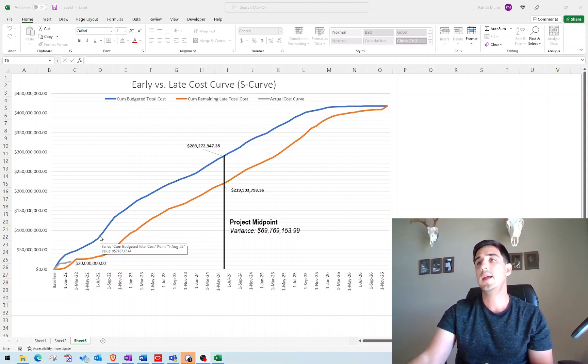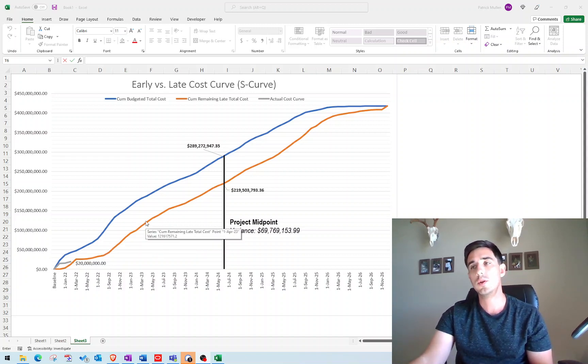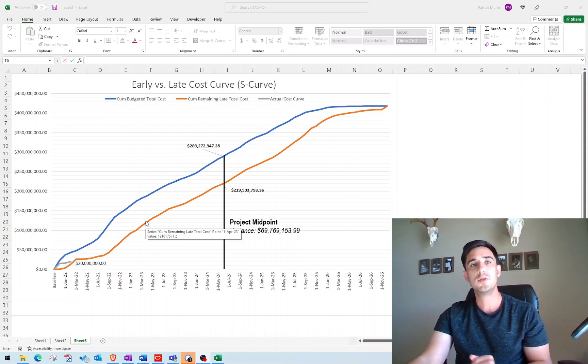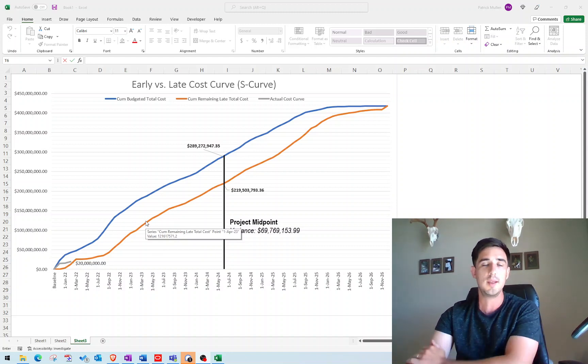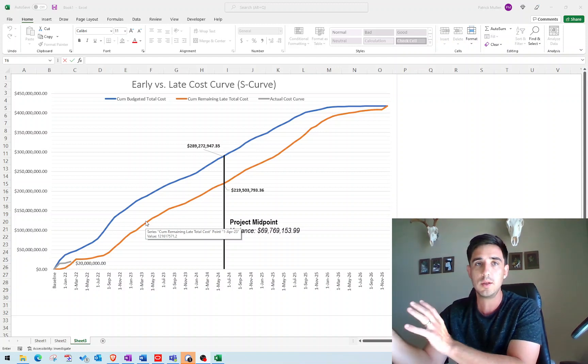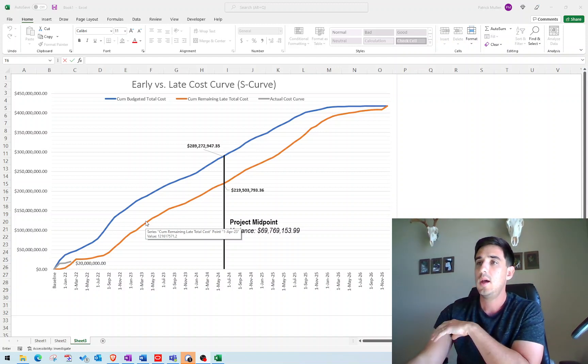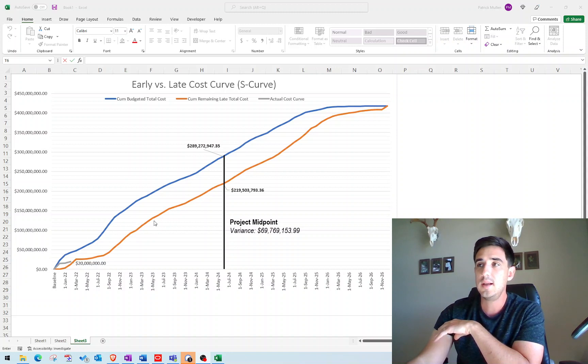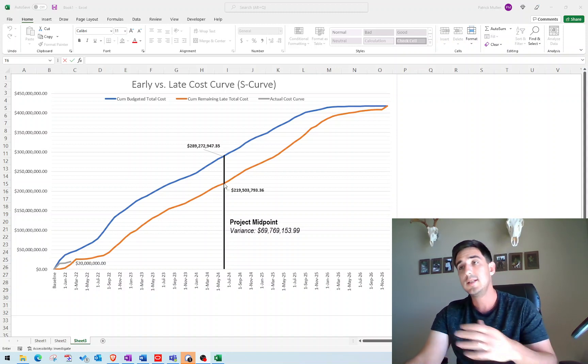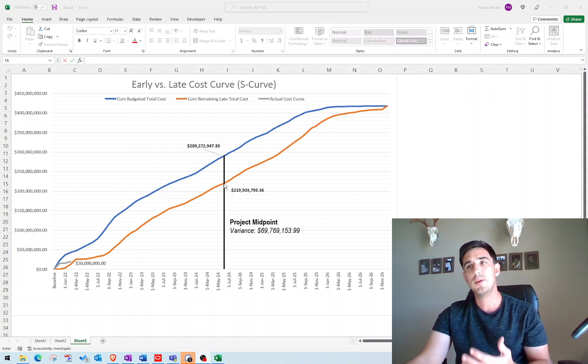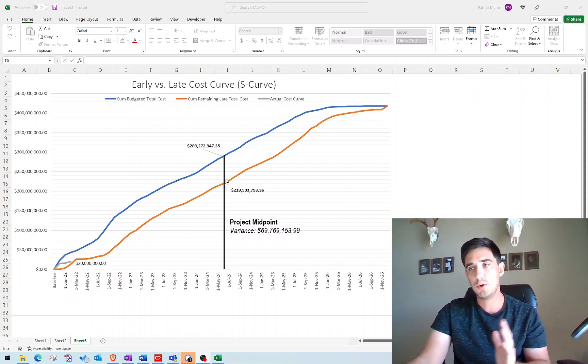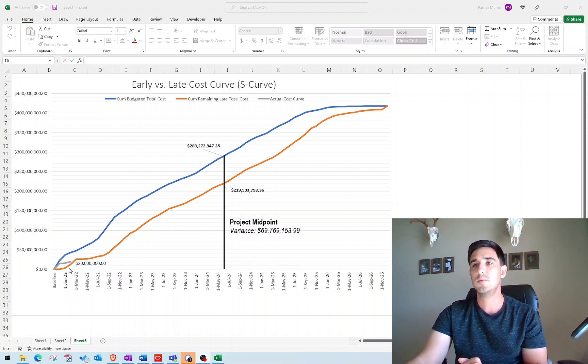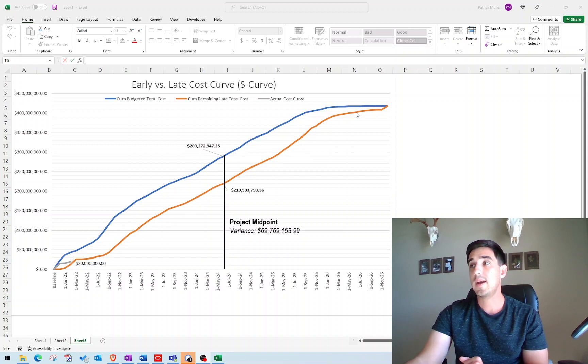Now the late curve is if we were to push all of those activities out until their latest point that they can occur without impacting the project completion date, that shows the spend from that curve. In essence, you're removing all available float from every single activity in the schedule, and you're pushing it off until its latest possible point. And then that is going to show your spend for that curve.